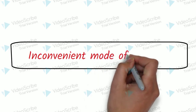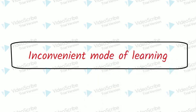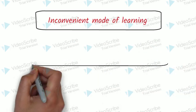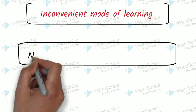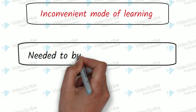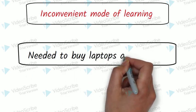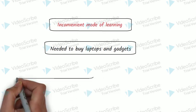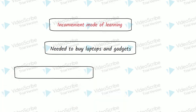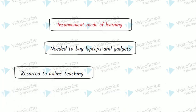Yes, that's right. They needed to buy laptops and gadgets. And why do they need to buy laptops and gadgets? It's because they resorted to online teaching. And why is that? Because the schools have closed.